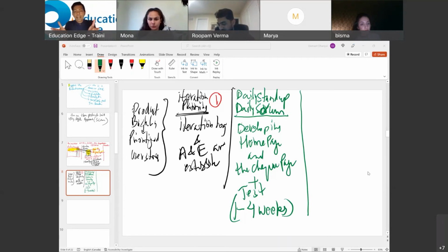Okay, so impediments. If Mona has an impediment, and let's say Urvashi is the project manager, this is not the time to resolve it. She just goes on the whiteboard and puts a post-it and says, well, Mona has an impediment and we will talk about it after the meeting. These 15 minutes are time boxed for this meeting every morning. And the idea of this meeting is to ensure that we are still on path to delivering the homepage and image capture. That is the idea of this meeting, right?